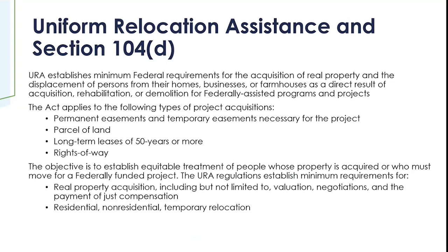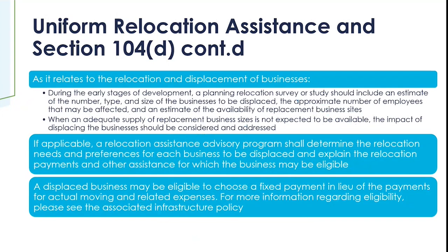Surprising to many, there are benefits available to a business if their operations are interrupted or if they're relocated temporarily or permanently as a result of a CDBG project. HUD encourages activities that cause minimal or no displacement, but occasionally in the process of a project, it does occur. The approach to addressing displaced businesses includes an evaluation of their specific need so that the appropriate resources can be provided. This may include things like finding available sites for businesses to resume operations, creating and deploying advisory services so that they can provide professional information and advice to businesses that are facing a disruption or dislocation. And finally, businesses that may be eligible for relocation benefits to cover moving and other eligible expenses.